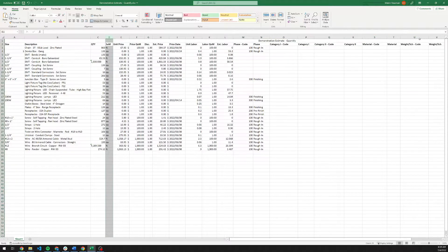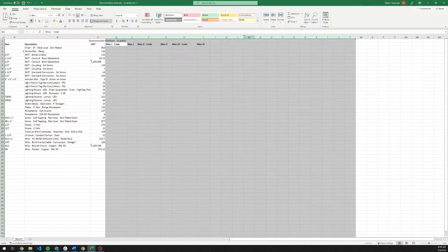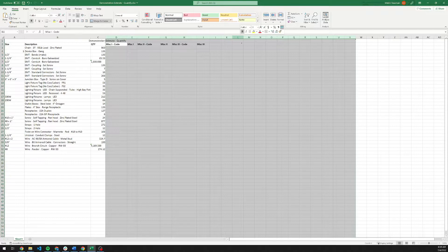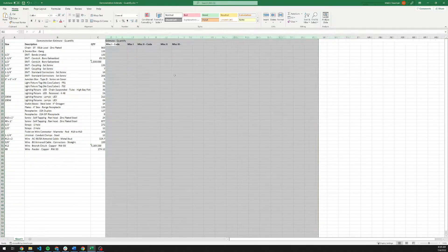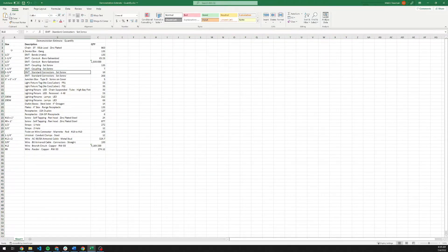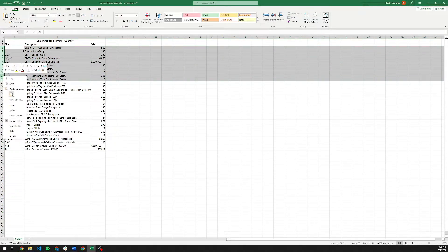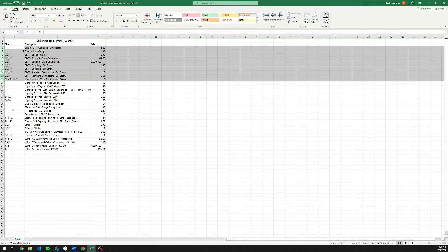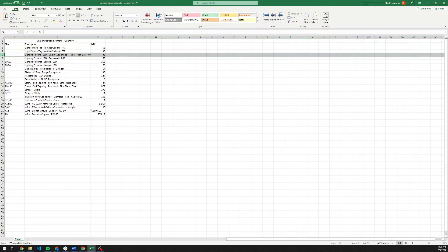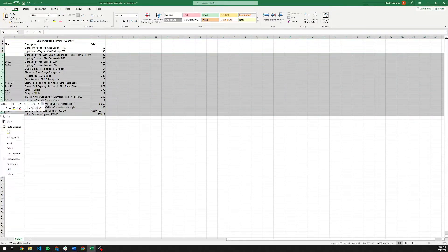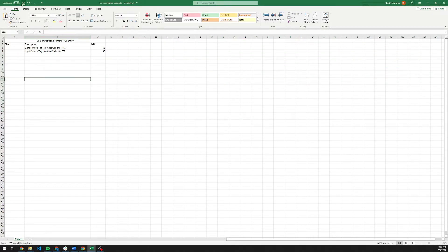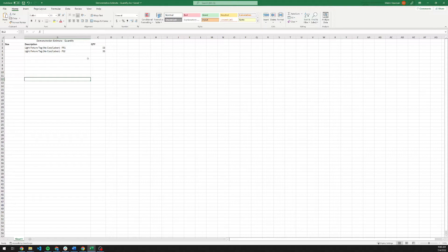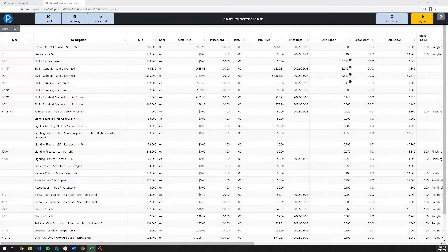Click on this to open it up in Excel. An Excel list of your takeoff. You can very quickly go ahead and delete the columns that aren't relevant. Then we can select the rows that we don't really need to send out to the supplier. Then save this. You can see within a couple of minutes here, we've been able to generate a pretty solid tag list of FR1s and FS2s to send out for quotation.